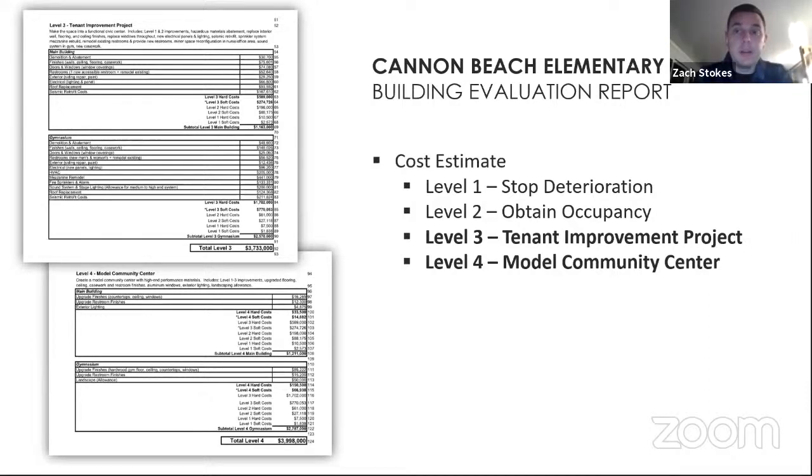I want to add to that real quick, Matthew. In the case of the gymnasium, we would not want to come in and do a seismic retrofit from underneath, because it would probably involve putting plywood sheathing on the inside of that barrel roof and covering up all the cool arched glulams that are there. I think that adds a lot of character to the building, and we wouldn't want to get that covered up. So we would want to do a seismic retrofit, or at least a partial seismic retrofit, on the top of the roof at the time of the roof replacement.